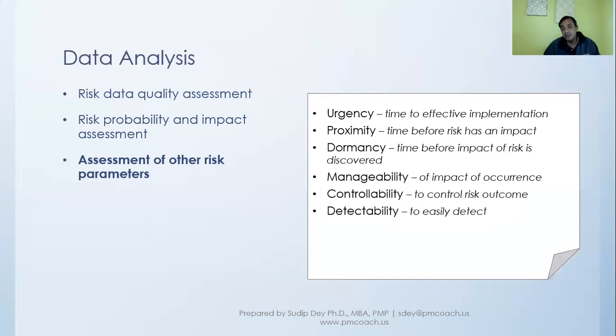Is it easy to detect? Because if it is something that is very difficult to detect, then we might be suffering that risk and not even realize it, and that will have an impact. And that will again affect how much priority we should give the risk.